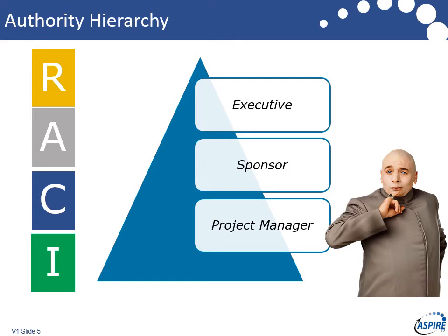The other one is informed, which basically means you're going to tell them what's going on. So it's questionable whether that's actually part of governance, really, because you just tell it. It's more of a communications thing, isn't it? So that's what RACI stands for. We actually use a slightly more refined one, which is called the 5 A's, which is approver, authority, actions, advise, and assurance. And we find that's much tighter when we're allocating them to roles. But best practice uses RACI, so let's go with it at this level.